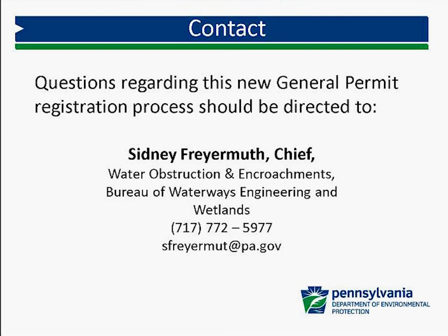Again, is an E&F plan required to be submitted to local county conservation districts for approval for projects under 1 acre of disturbance? An E&F plan is required to be submitted to the county conservation district for all projects, regardless of acreage.